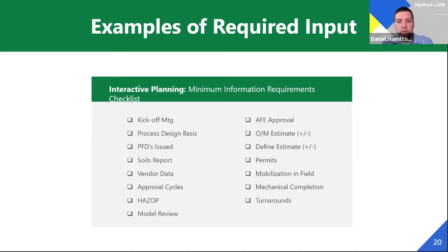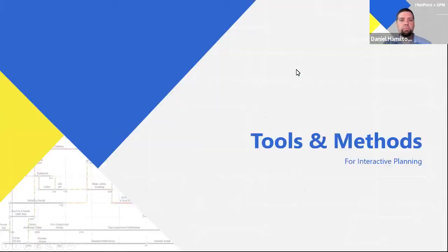And then we do make sure that we, at least 2 weeks, maybe a week before our interactive planning session, touch base with the project team members, the disciplines, to make sure that they understand their deliverables, they've read the scope of work, they know what the overall timeline is, that they come to that meeting with their deliverables, understand the durations of their deliverables, and have some kind of interaction with their discipline counterparts, so that we can have a really good meeting and get to a project schedule in interactive without debating a bunch of deliverables and what the scope of the work is.